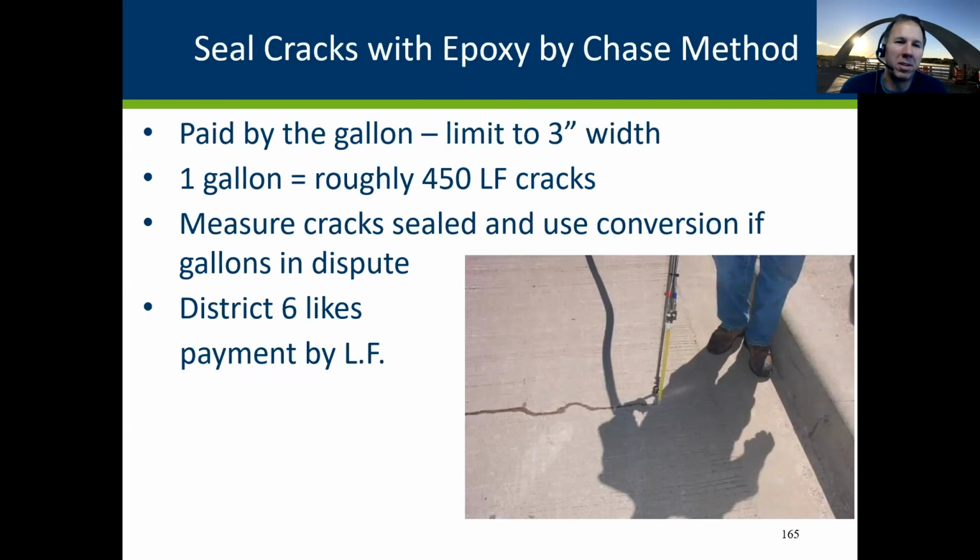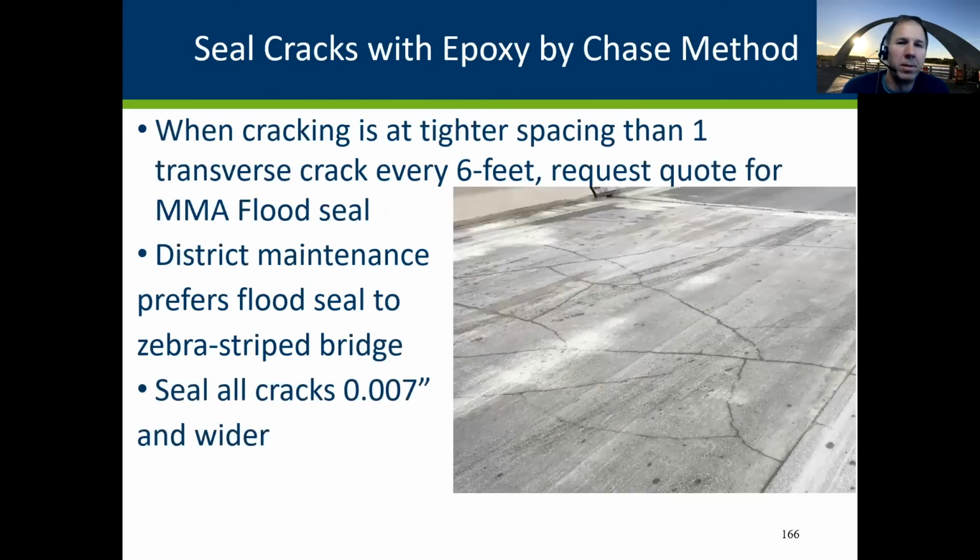So if there's a dispute on the number of gallons, we can refer back to that coverage rate. District 6, they like payment by linear feet. They like to measure their cracks. So if you're serving support in that area, you're going to be measuring the linear feet of cracks sealed. So that is the seal cracks with epoxy by Chase method. It's a long pay item name, but we're trying to get more descriptive with our pay items so that there's no question on what they're bidding.